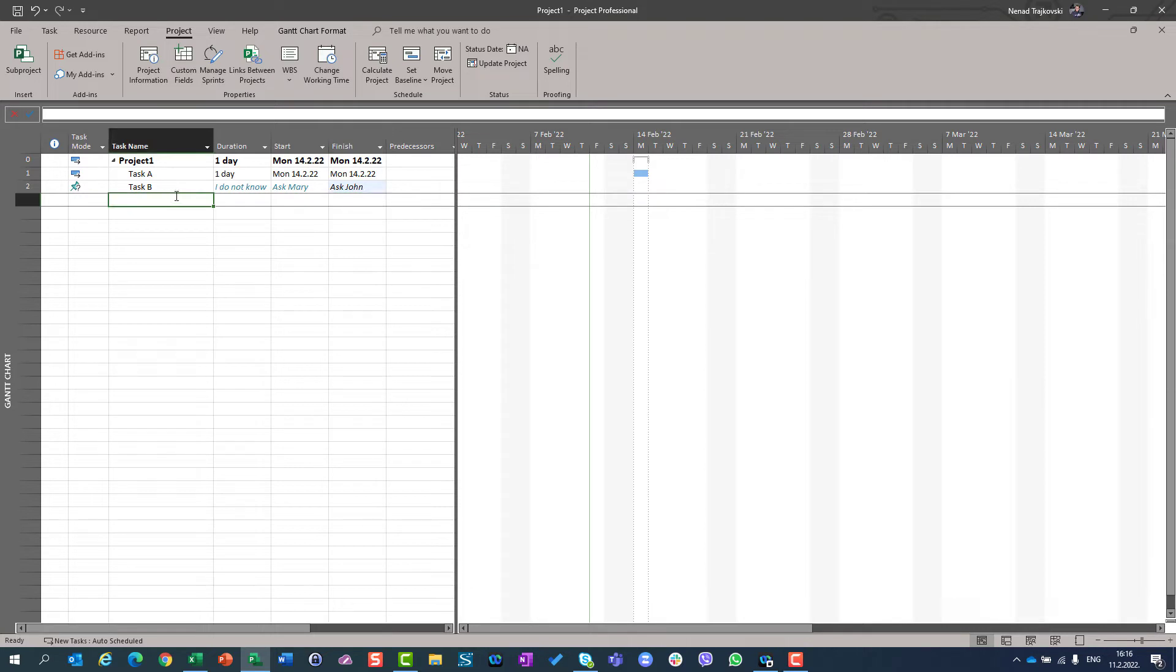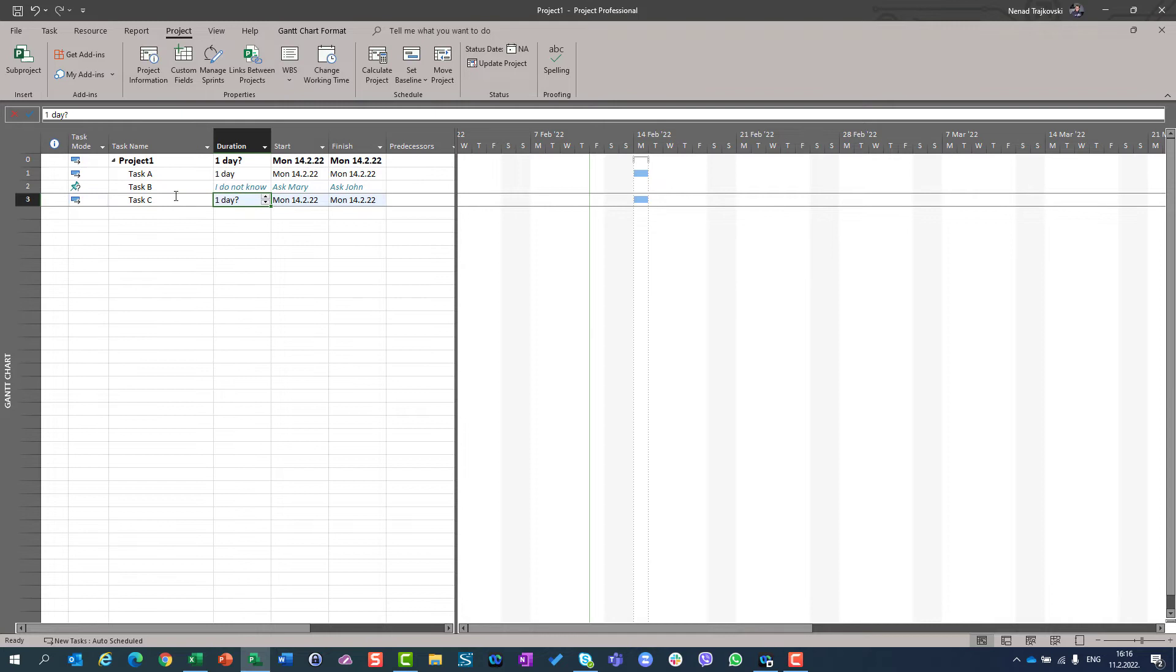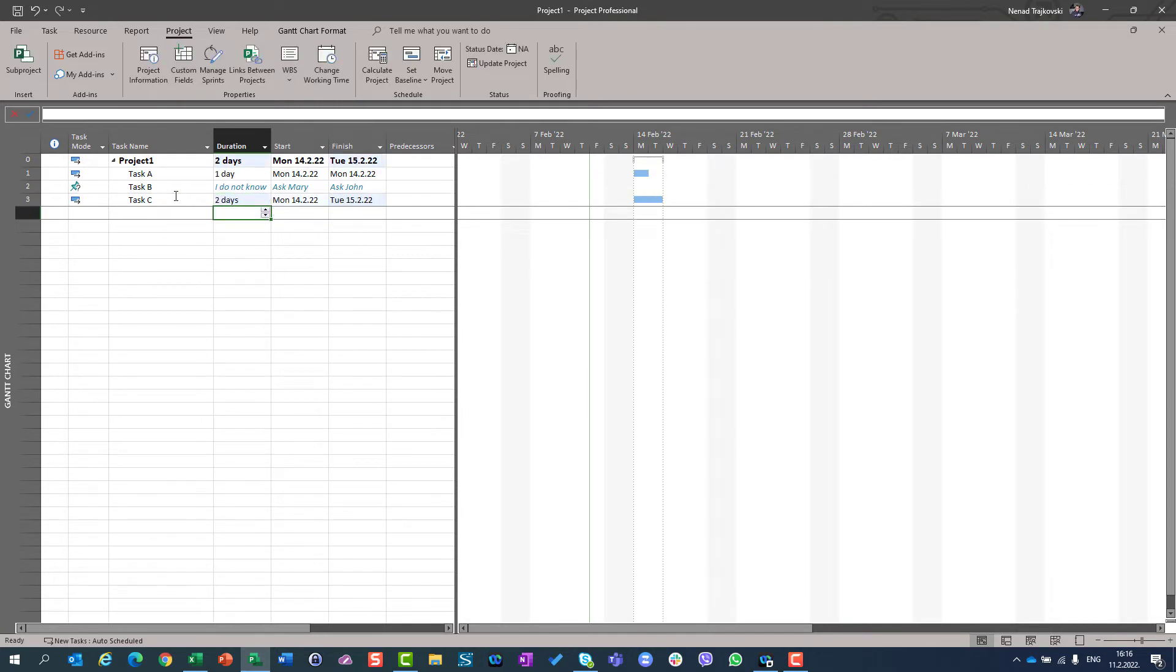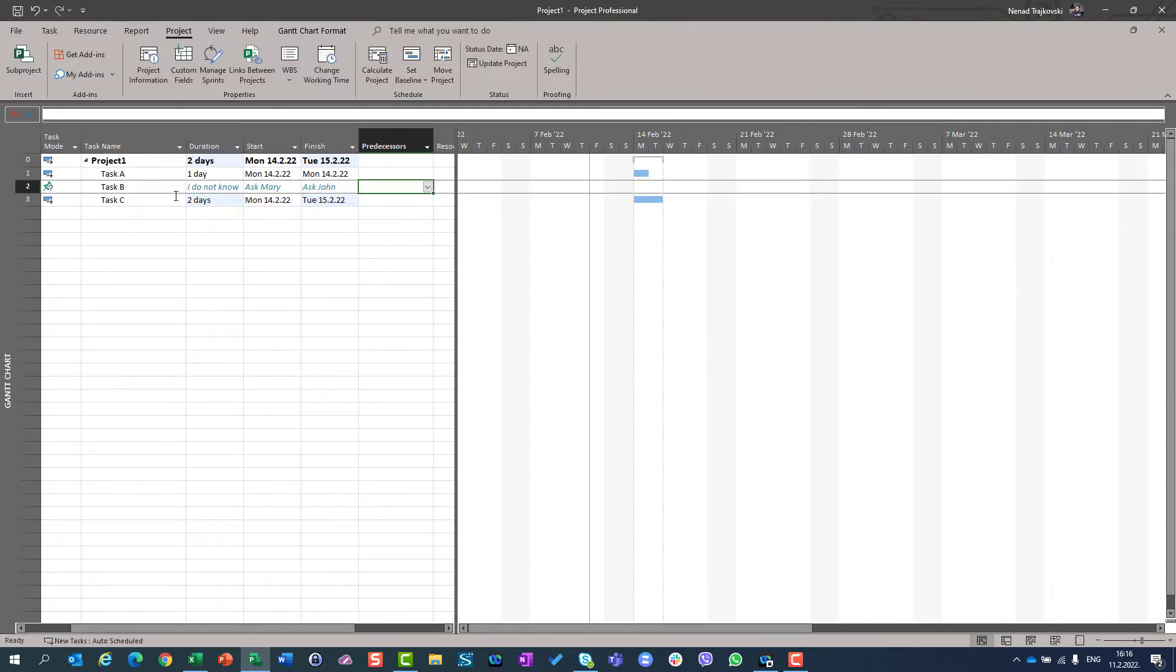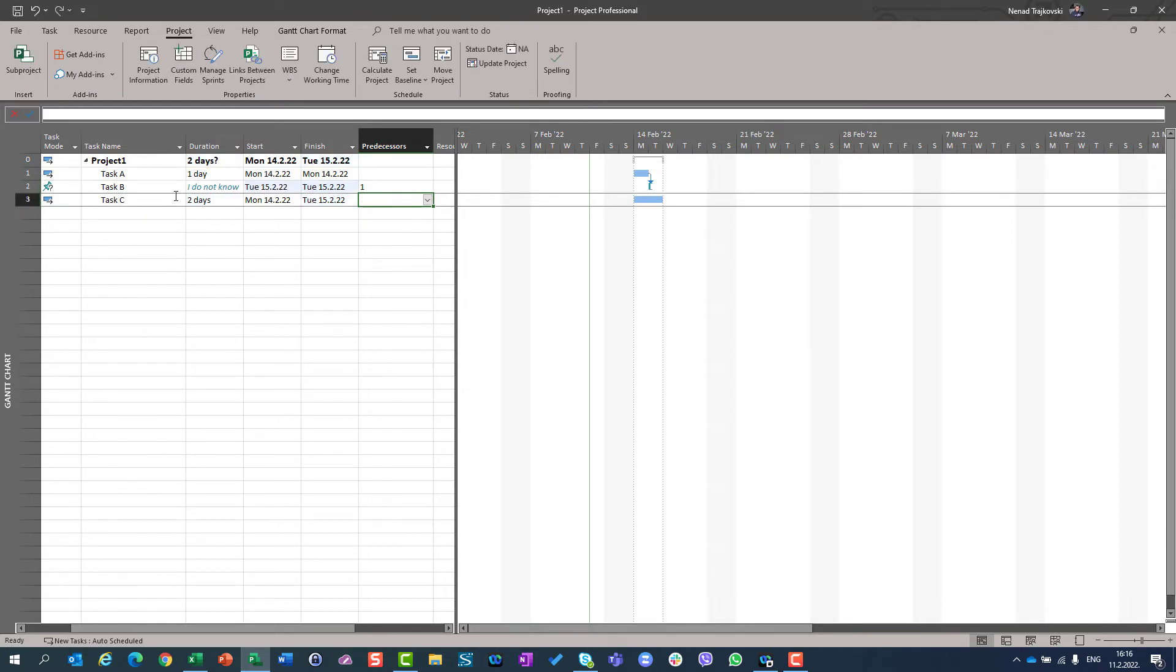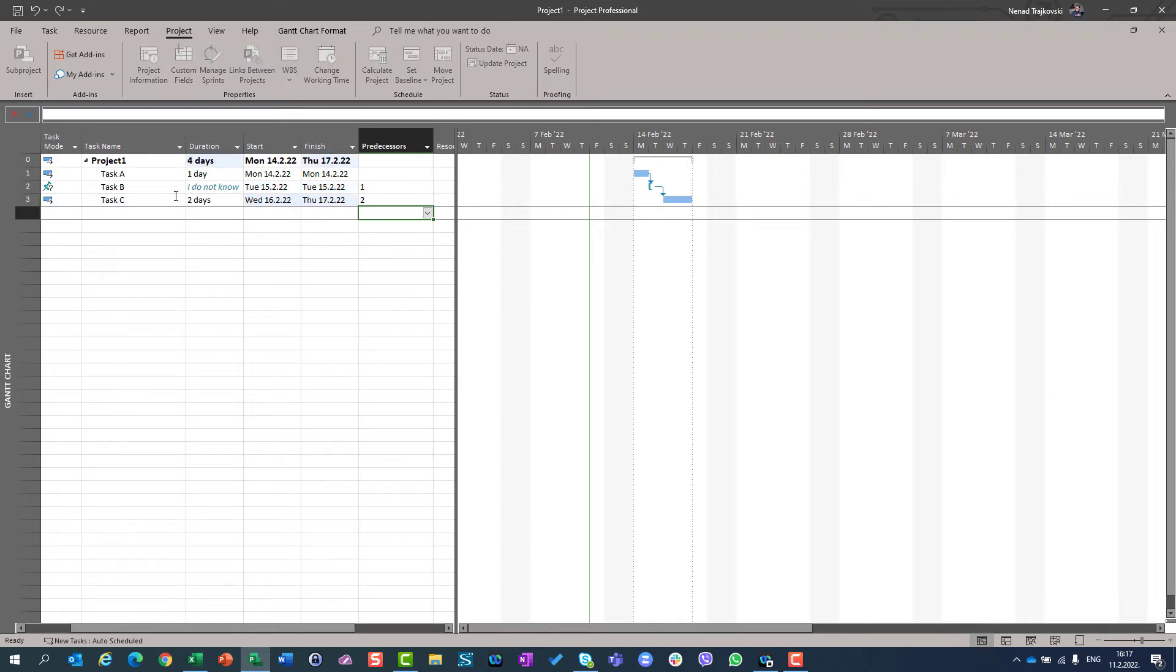So let's say that I have task C, and I know it has two days duration. What if I say that task B will be started after task A will be finished? And task C is going to be started after task B is finished? So I will say two here.